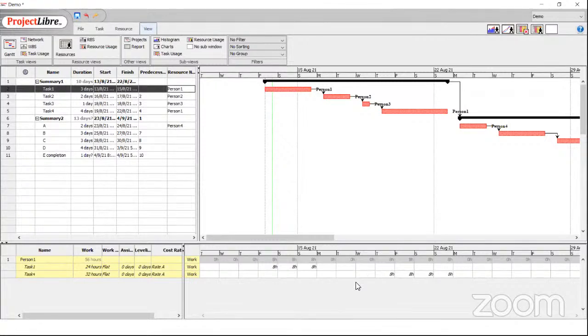But the fact is, depending on the nature of the task, this resource may not actually be engaged for the full of the 8 hours. That's also a factor we have to keep in mind. And that's why any balancing that we need to do to see if a person is overloaded is something that you can do simply by having this view in front of you. So this is what you typically do once you have populated all the activities in your project from start to finish. And then if some overloading is happening, go to the resource view and look at each resource and see how they are engaged in terms of time. And that gives you a visual indication which you can use to do any adjustments.